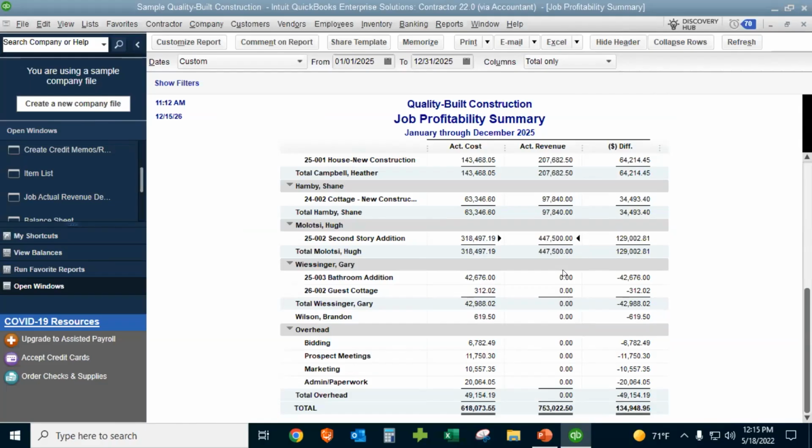home builders that are putting everything to the balance sheet. When they close out a job, they'll do it on a sales receipt, and they'll put all the costs on as negative amounts on the sales receipt. Like their commission would be a negative amount on the sales receipt. Since it's showing up on a sales receipt rather than as an actual cost, it shows up as a reduction of the revenue.